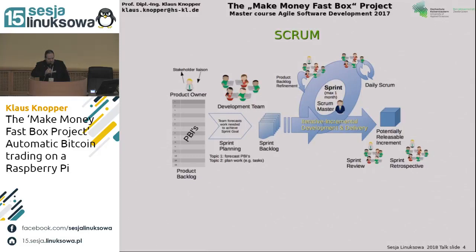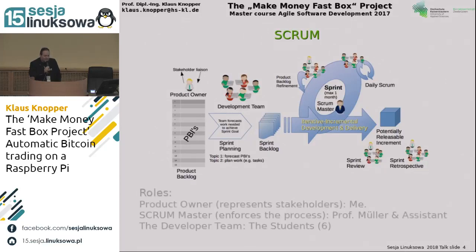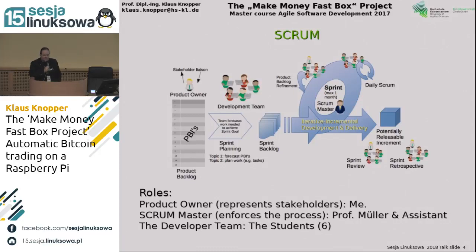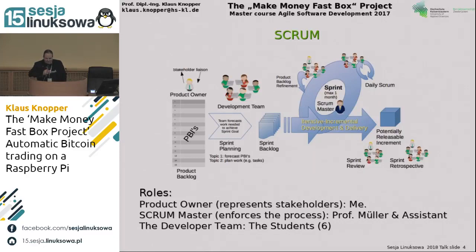The Scrum method we used consists of sprints. During one semester we had sprints of about two to three weeks to complete one task or milestone. We had a trained scrum master — my colleague Professor Müller — and I acted in the role of product owner, meaning I tried not to get too involved in the development. The development team consisted of six students; more in the beginning, but some dropped the course after they learned what it was about.